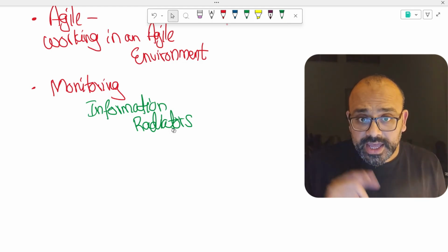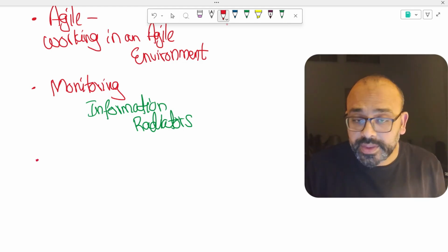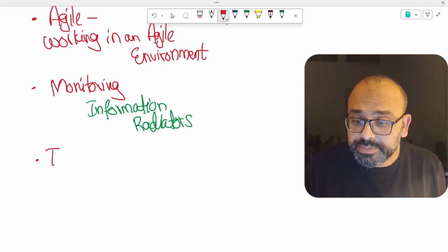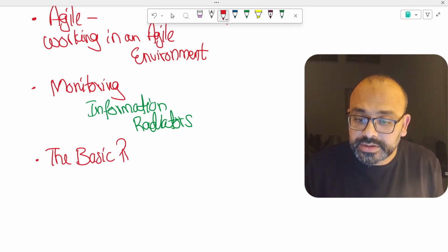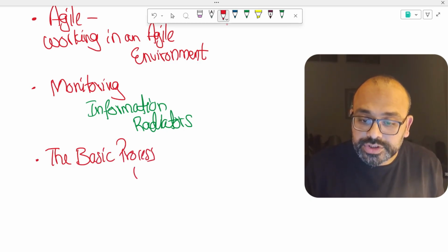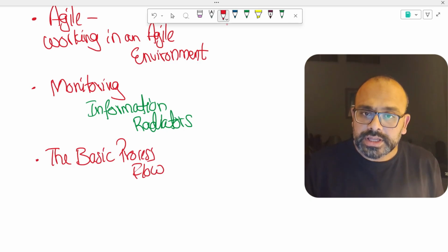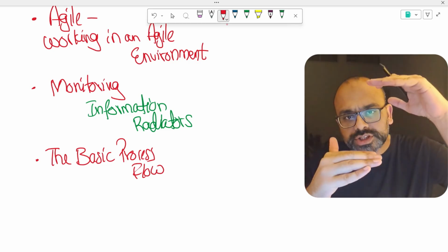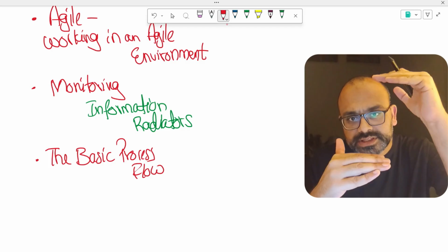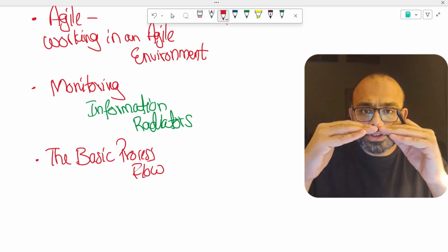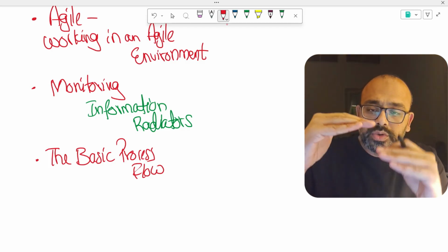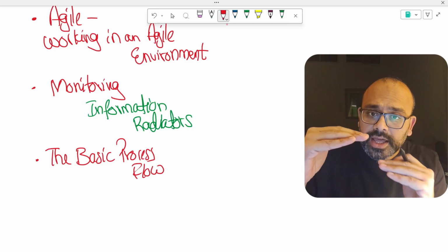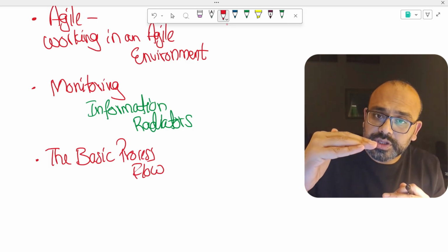Okay, and then there is one of the videos that I have made. You can watch it on the channel. It is the basic process flow. That project starts with a project charter, and before the project charter there is a needs assessment and the business case. Once your project charter gets approved, you have a project management plan, and then you go and start executing the work.